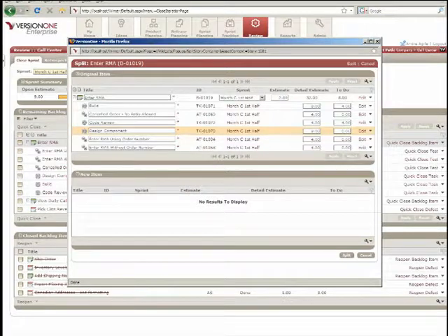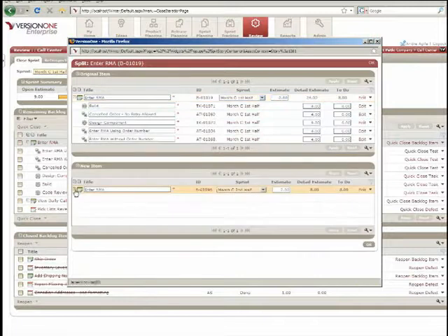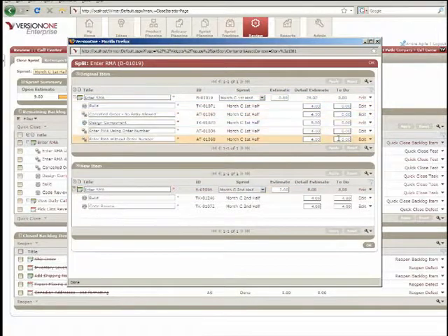So when we split the item in version 1, my blatant shameless plug. Shameless plug, that's the term. When we hit the split, all the tasks that had already burnt down, in other words, that had 0 to do, remain with the original story. But then we have a new story, and notice it has its own unique identifier. Then we can go ahead and edit it.